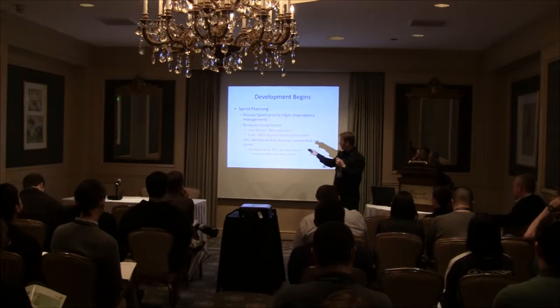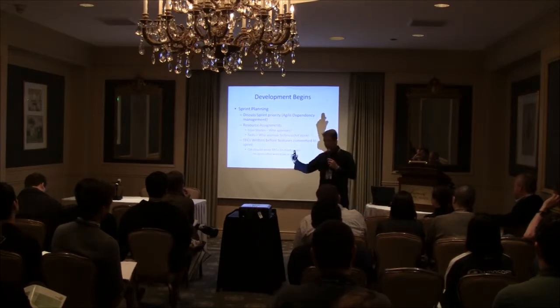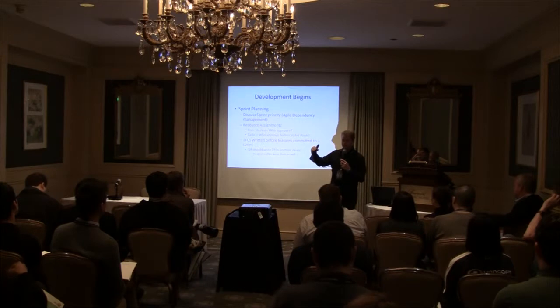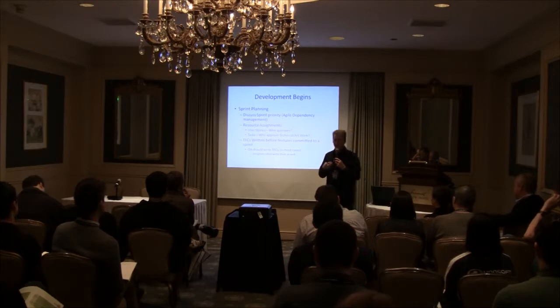So TFCs should be written, as I mentioned earlier, before the sprint starts. I like to see QA write the TFCs. I've been to studios where the person developing the work develops the TFCs. I will tell you that's going to lead to a pass almost every time, because if I'm writing the TFC and I'm writing the code, I will get it right every time.